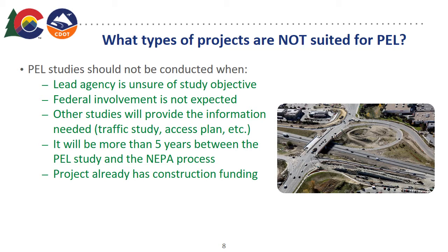Some other types of studies will provide the information needed, such as access plans, a traffic study, or just an existing conditions overview, and a full PEL study is not needed in those cases. If done following 23 CFR 450.212 and .318, those studies can still be used in future NEPA processes even without a PEL study.